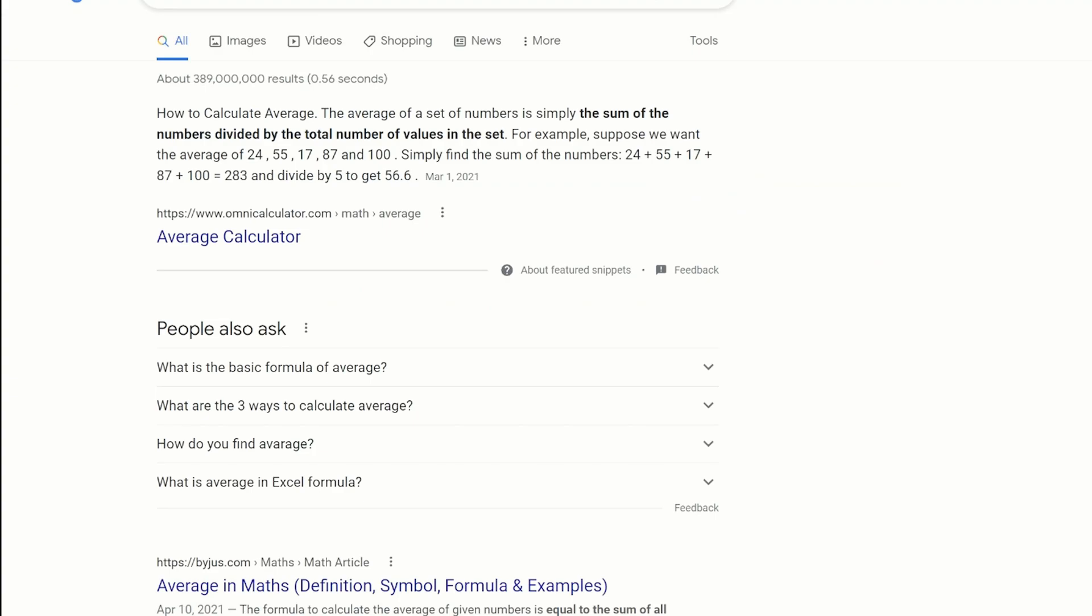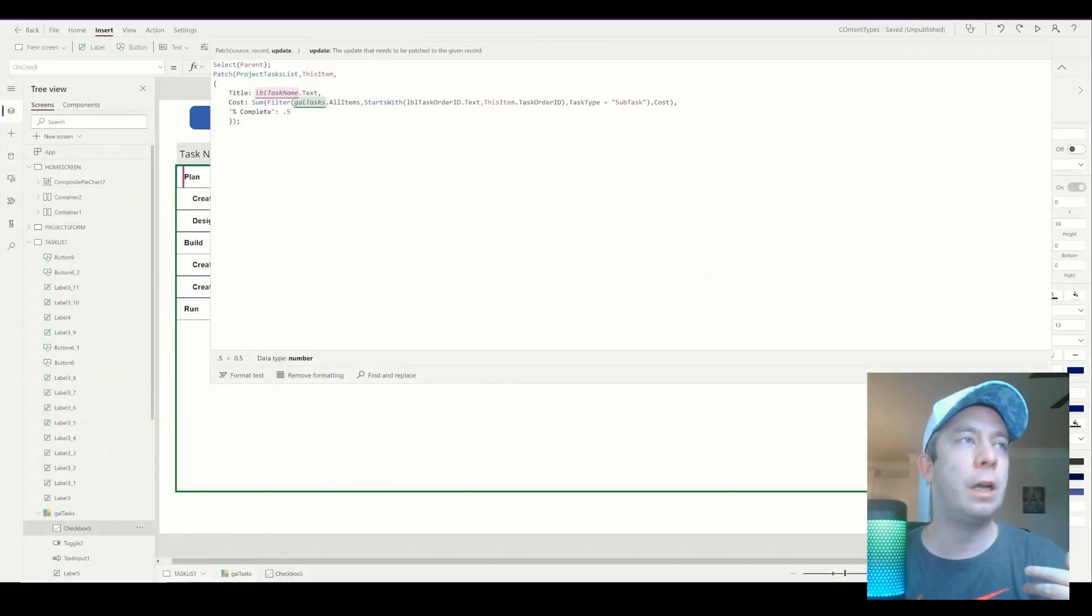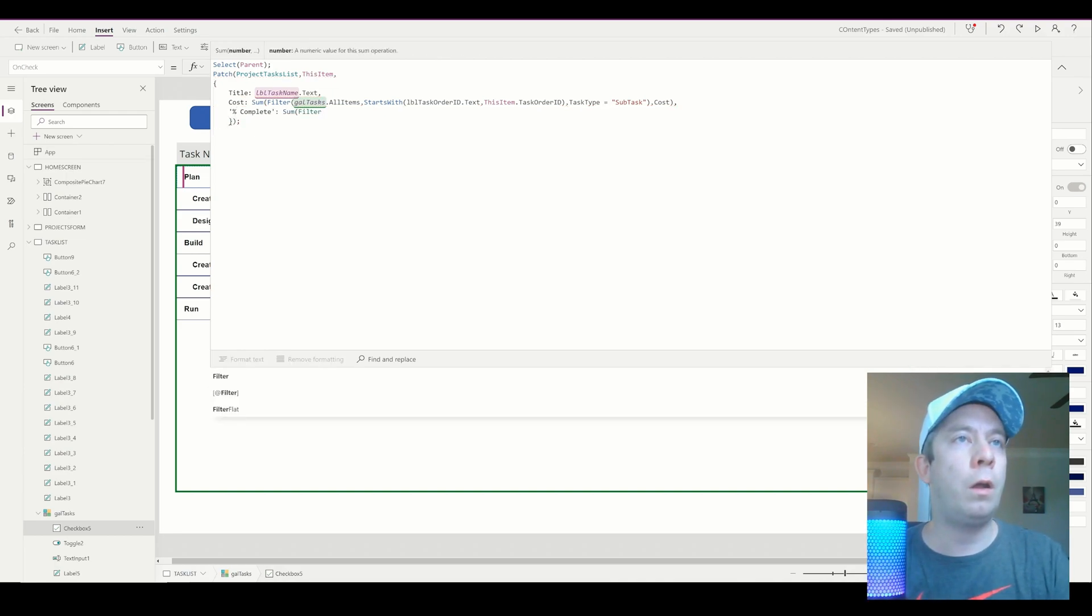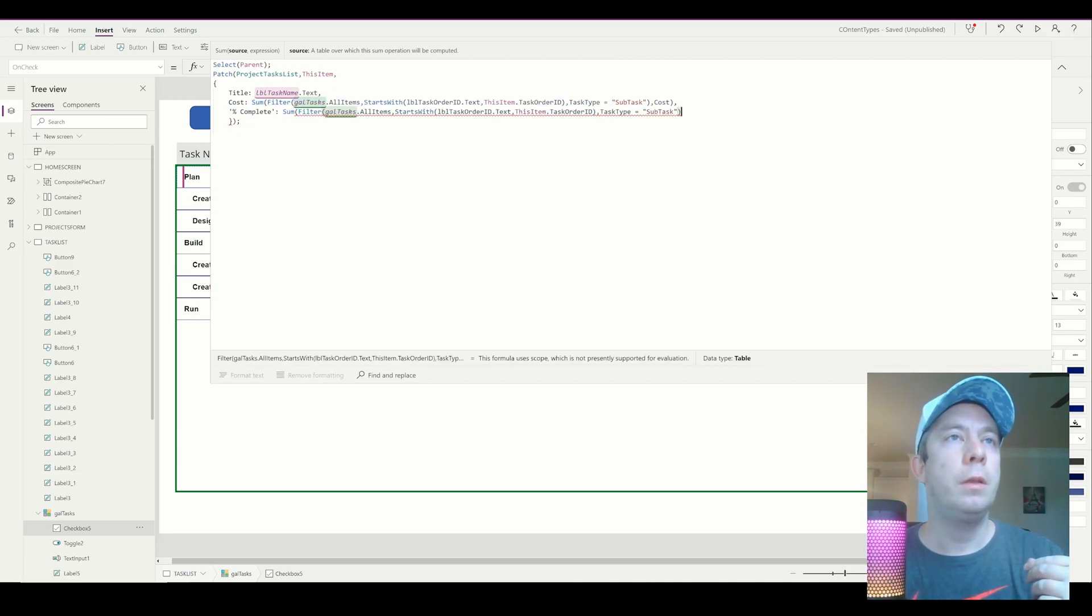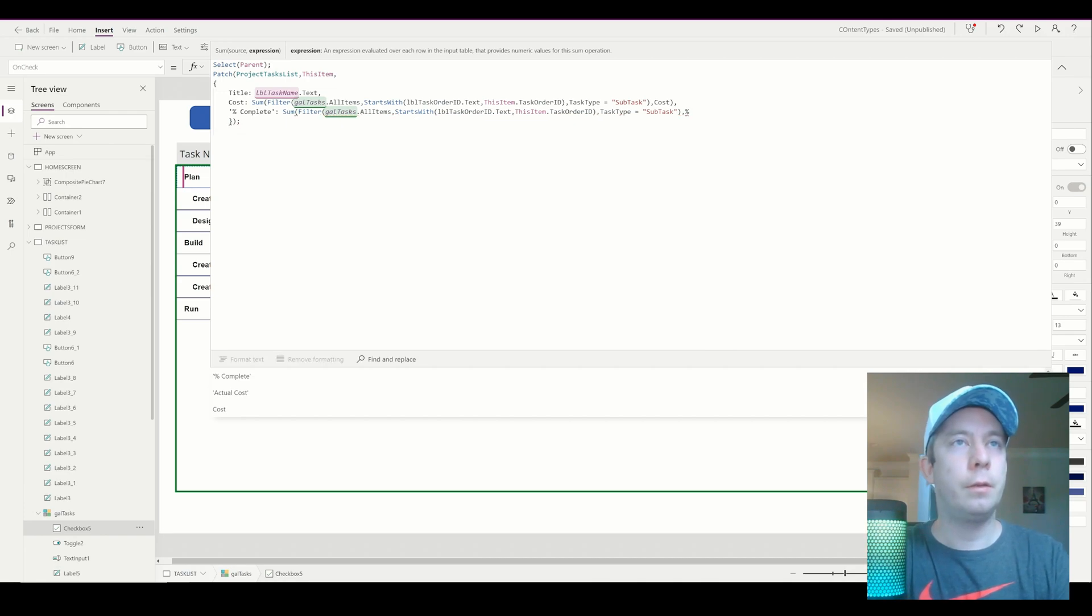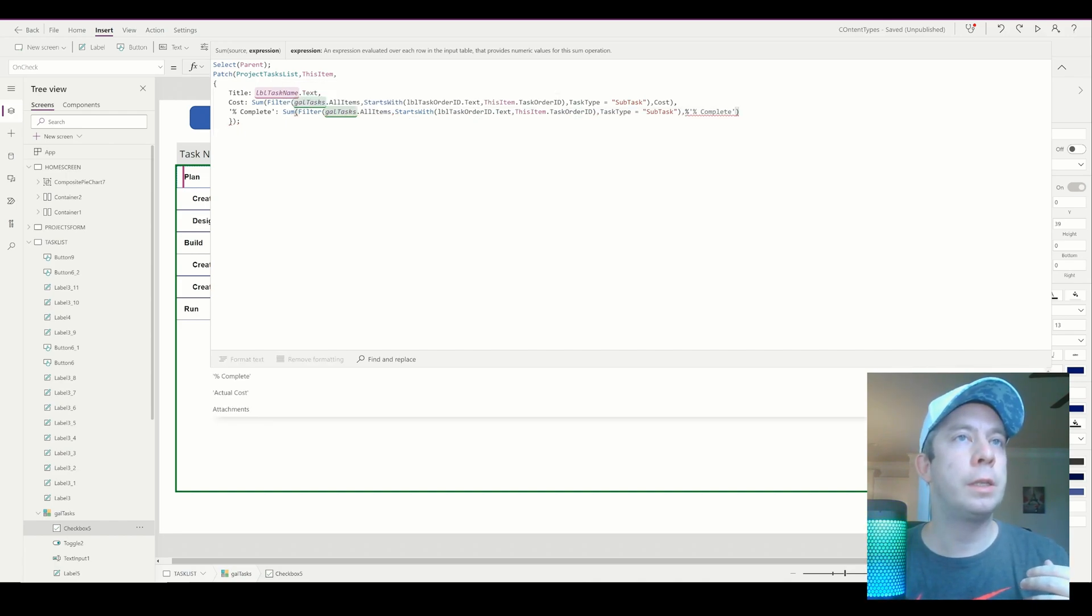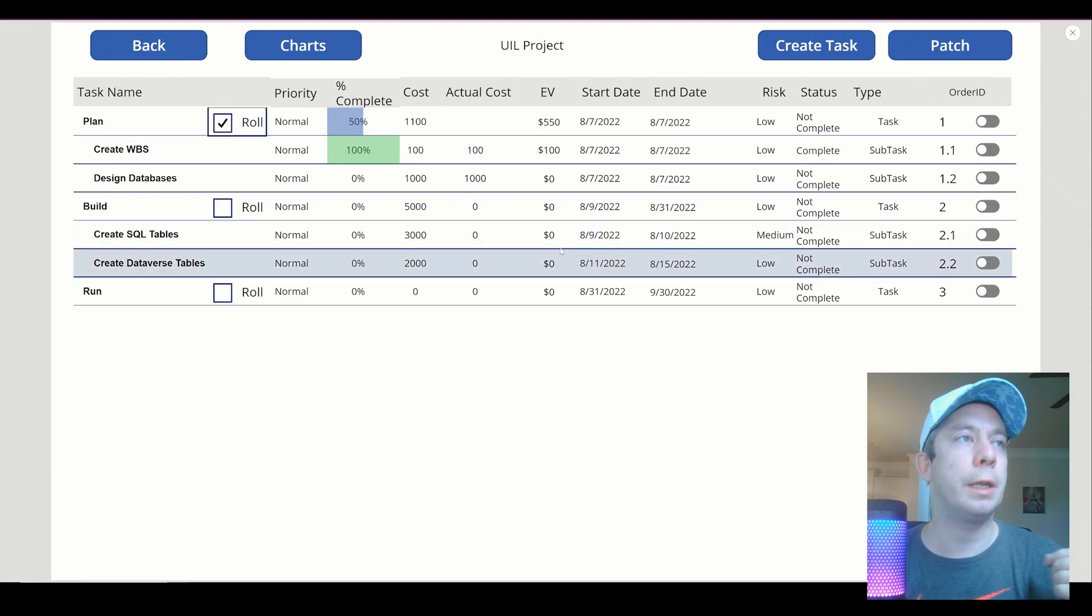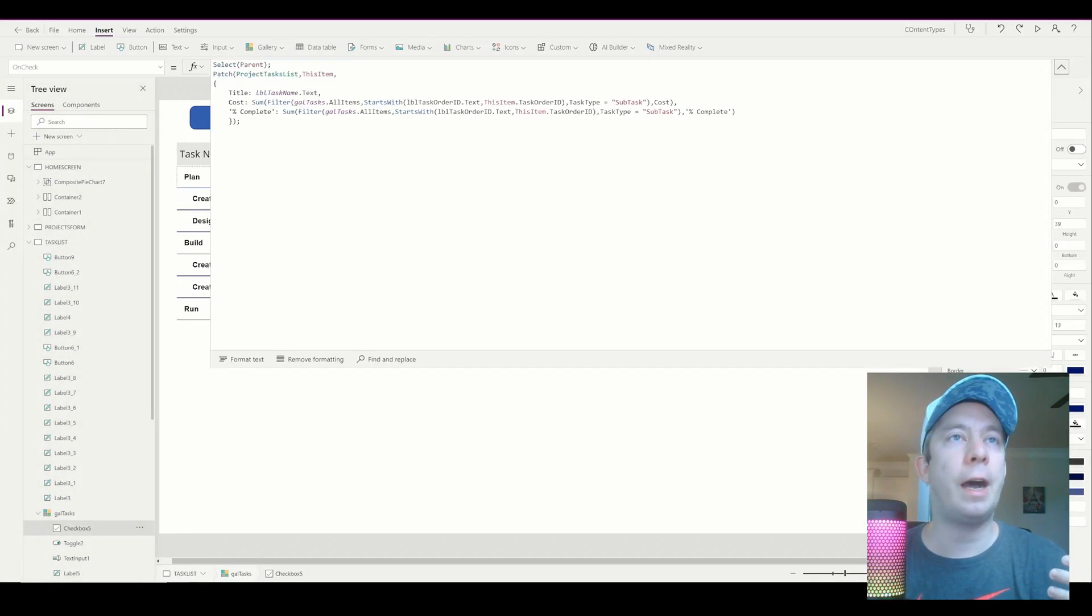Now let's keep building on that. So just in case you're wondering, we're doing a little math. I know this is basic, very simple math, but we're going to find the sum of the numbers divided by the total numbers of the values, right? So we want to find the sum. And pretty much this is the same thing, right? Filter all of them when they equal subtask. So we're going to do that again. And this is the percent complete. So let's get that working first. So let's find the percent complete. There we go. Let's sum them. So we got the sum working. So it's now 100 percent, right? 100 plus zero is 100 percent.